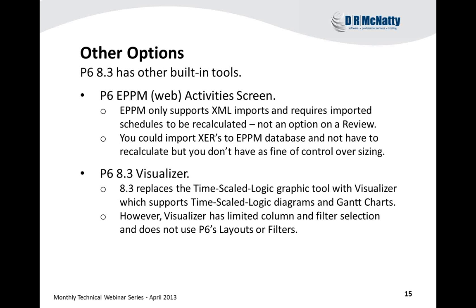With P6 8.3, there's a new tool included called 8.3 Visualizer. So Visualizer replaces the timescale logic graphic tool that is in 8.2 with a tool that supports the same timescale logic diagrams as 8.2 had, plus it does Gantt charts. The issue there, though, is that Visualizer will only support 4 columns.